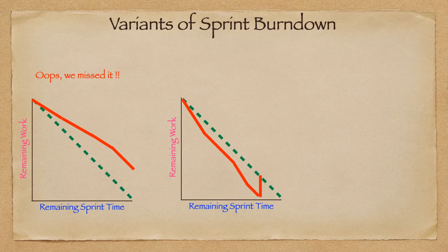And they started working on that, and by the end of the sprint, if the team is able to complete the newly selected item, the red line will come and touch the x-axis and becomes 0. That means in this example, the team was able to do a little more than what they had selected into the sprint at the sprint planning.